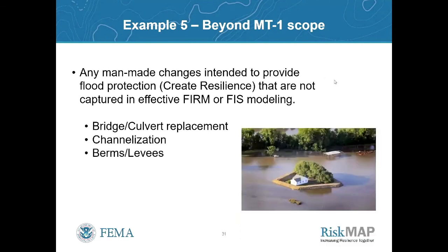Creating berms or levees is well beyond the scope of MT1. We cannot approve certification of levees. We cannot consider levees providing protection under the MT1 process. If you're doing anything as extreme as this photo, you definitely have to go through the MT2 process.